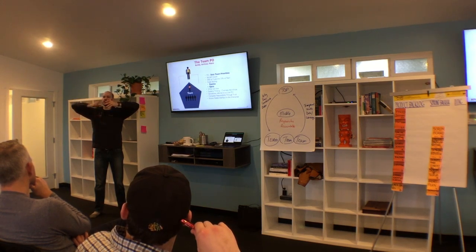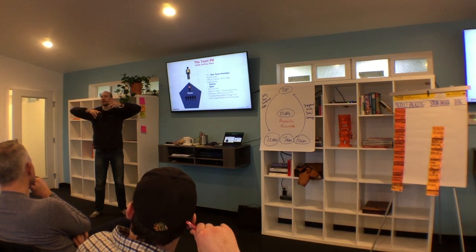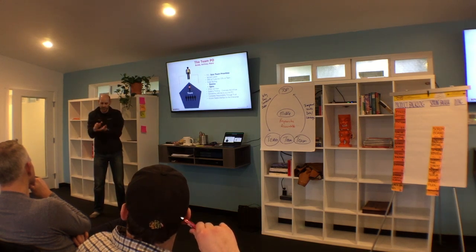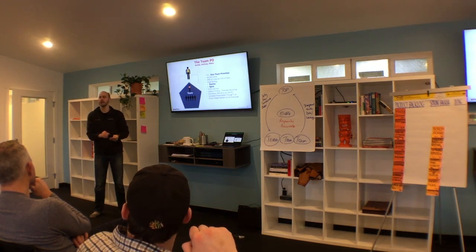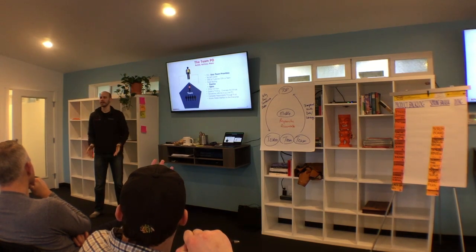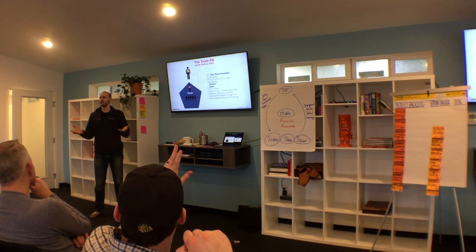If a story has been split so small that it now specifies what to do, how, it says, just install the database already. We split it so small, it's just, okay, do this. We now call that a task. But that's it. It's just granularity. Epic, stories, tasks. I don't feel a need to differentiate them most of the time.